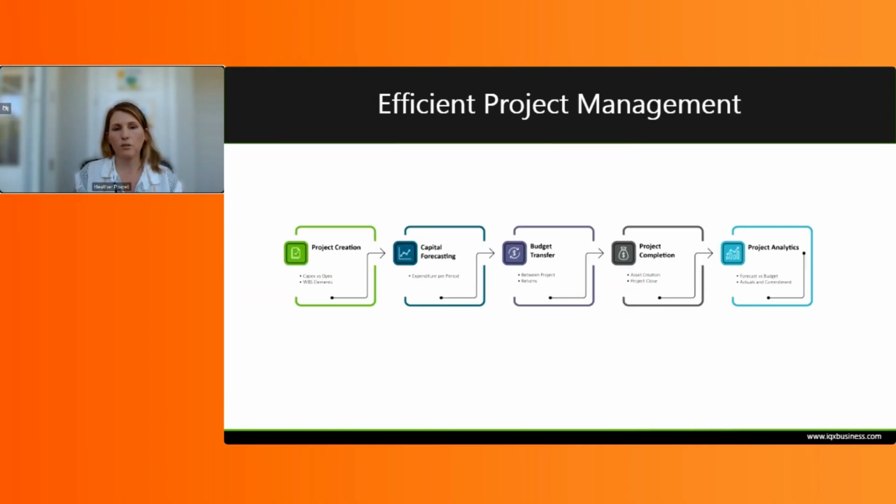So once the project is created and the budget is assigned, procurement for that newly established project will commence and will continue until the project is ready to be capitalized. During the duration of the project, costs will need to be reassessed and forecasts need to be made. So IQX were able to facilitate the following processes during the phases of the project lifecycle: the capital forecasting, the budget transfer, project completion, and project analytics.